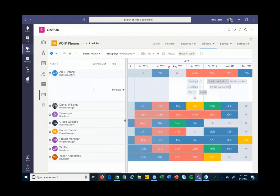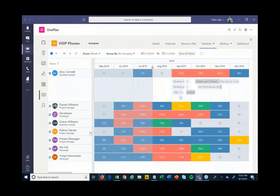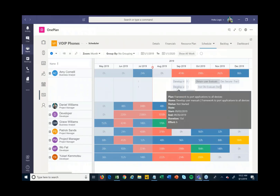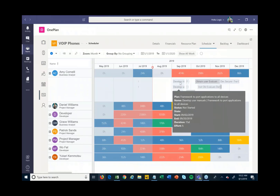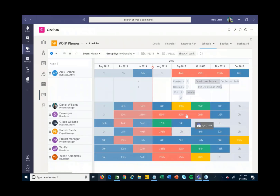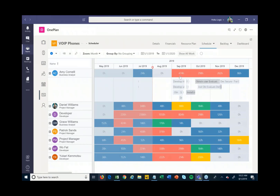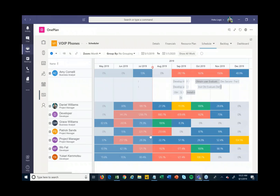Now you'll see a full view of not just the work for this particular project but the work for everyone working on this project across all of their projects. The other tasks show up grayed out — meaning I can't change them — but they show up for visibility. You can see that certain people are very over-allocated, highlighted in red.